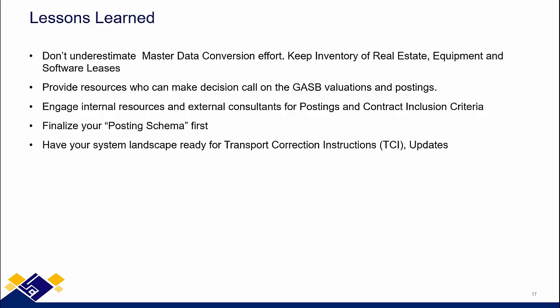Go ahead, Sanjay. Yeah. The fourth point is to finalize your posting schema. By posting schema, I mean what kind of journal entries you are expecting to be posted. Many of our clients, and I think many people on this call, will have both modified accrual and full accrual applicable. That brings a lot of complications. So if you can finalize the posting schema before the project starts, it will be very helpful, because then the consultants know what kind of journal entries are expected from the CLM module, and we can jump straight into the configuration and complete the posting schema.